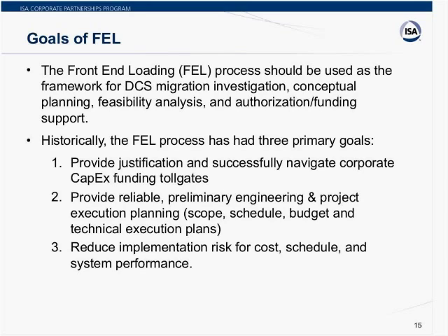It's often not enough to merely say the existing DCS is obsolete according to the OEM. There needs to be a lot more estimation, planning, and analysis of options put together in order to justify a project, including, what we've seen oftentimes, looking at the total cost of ownership over 10 to 15 years, which can help justify projects. So, again, that one's pretty obvious, but well stated.